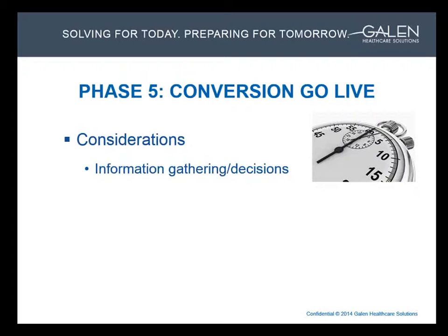Well, if that's the case, then there would need to be a go-live action item track to make sure that, for example, providers verify all outstanding results before the source system is taken offline for the conversion. Or at a minimum, the client would want to discuss an alternate plan with their lab vendor. Either way, an issue such as this one would need to be tracked and discussed as part of go-live planning.